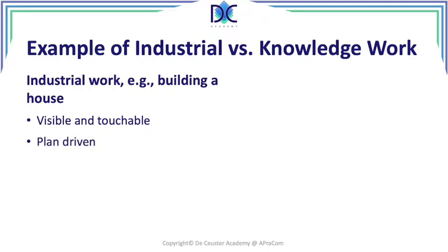The design, the building of that, or the construction of that building is a plan-driven approach. We have to plan the things to do them in the right order. We cannot build the foundation after completing the building. We first have to put the foundation there, so we have to know what has to be on top. There are clear standards and norms. A lot of standards have been written for these, how to calculate, what are the loads. All these things have been regulated, and we can use them, and we have to follow them.